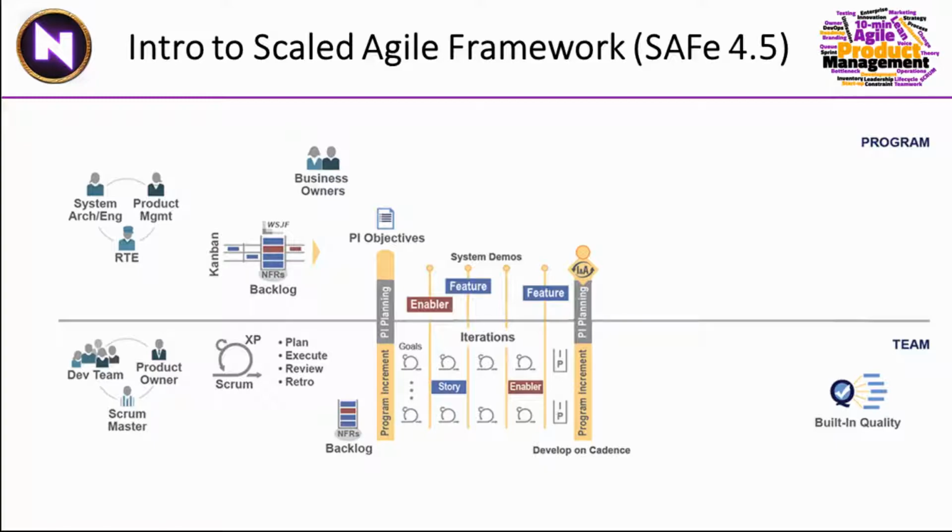And what happens is the features are presented, the teams take the features, break them down into user stories, and start planning them, start negotiating between the teams about who can take which user stories. This is because there may be competencies in some teams that are not in all teams, such as network, security, UX, database. We don't want a UX team or a database team, definitely not. Teams want to be as cross-functional as possible, but we don't have a UX engineer, a database administrator, and a security expert in each team. So there are teams that are better suited to different user stories.